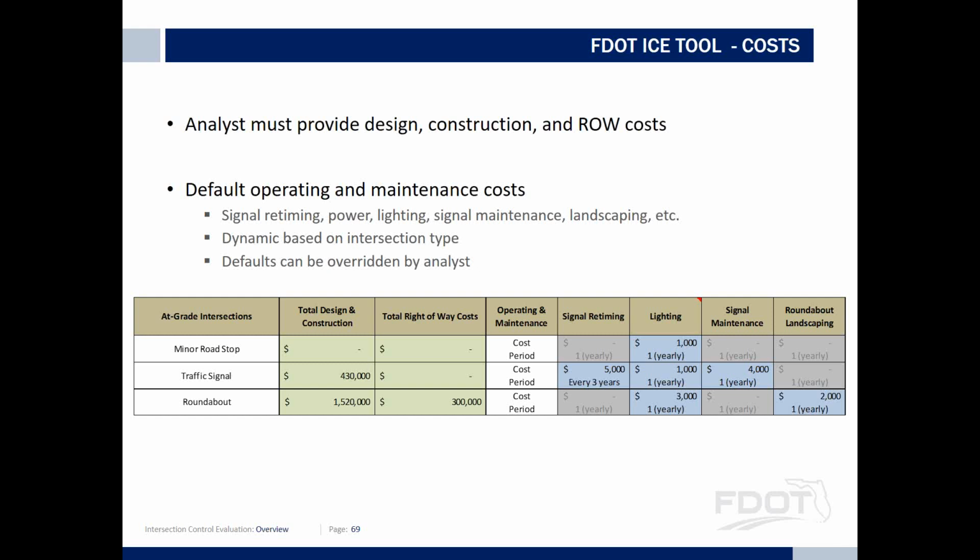Now, I mentioned earlier that some of the construction costs for these alternatives are available from the documents or from the resources FHWA has. But we are also working on getting a more recent estimate of construction costs, and we're also working on a design cost too. We're asking around, asking other states what they're doing, how many intersections they've built, what's the cost of them, what's the design cost. The right-of-way cost, we're talking to the right-of-way folks about getting what we call a conversion factor.